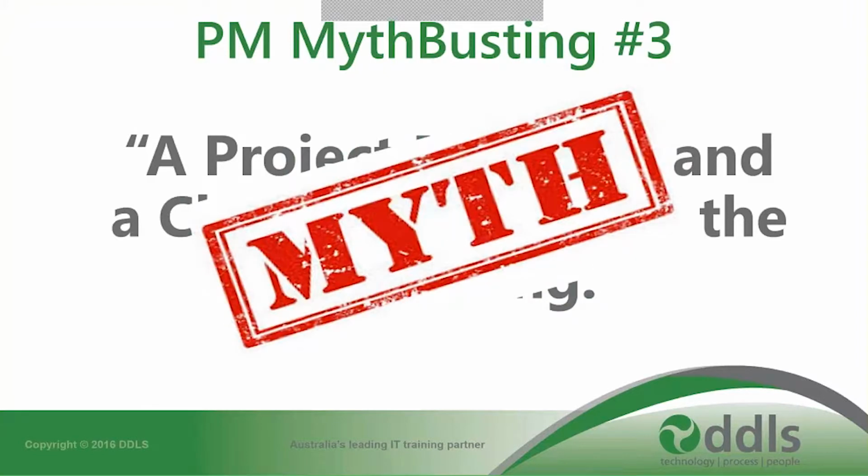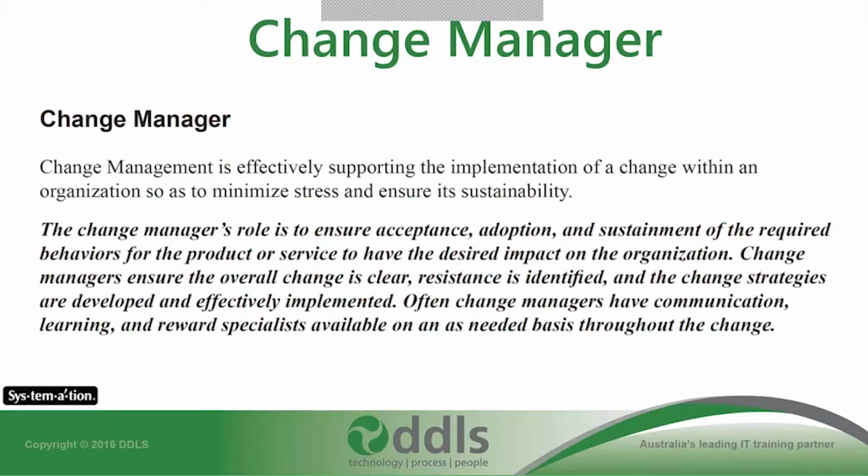Not to say that a project manager can't be a change manager. The definition, according to the BABOK, with the full definition of what the change manager is, says that the change manager's role is to ensure acceptance. So we've got the responsibility as a change manager to really make sure that people come across the change, that they actually accept what the new to-be world is. You've got to make sure that people have that buy-in, which can sometimes conflict with what a project manager has to do, because a project manager cares about the time and the cost. A change manager needs as much time as possible. Why? To get people across the change.